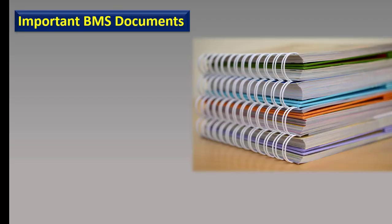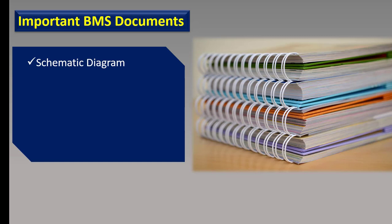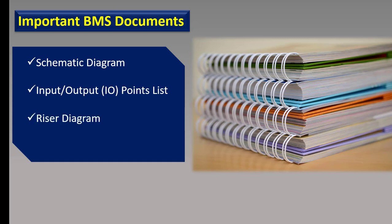We have the following important BMS documents which are used for the technical submittals and in the operation and maintenance manual. First of all, it is schematic diagram. Then we have input-output or IO points list. Then we have the riser diagram and also the bill of quantity or BOQ, which is very important for the technical submittal of BMS. Apart from the above, data sheets of the field devices and other equipment are also very important. In this video, we will talk about only schematic diagram and IO list.